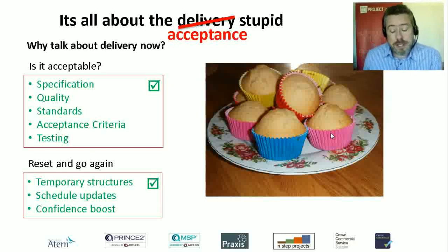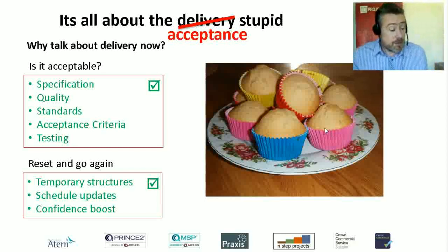So it's a really good time to go back and update plans, risk and issue registers, communications documents, etc. So several things to do if you're staging your delivery on the way through. Really useful confidence boost to get things ticked off and out the way and visibly delivered. It helps you as a project manager, if it goes well, of course, to establish a good track record with the stakeholders in the project. So that's some of the theory of it. Let's go and have a look at some of that in practice.